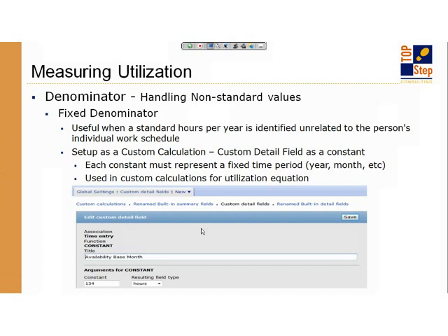The limitation with this, however, I do have to caution you before you get all dreamy-eyed, is you have to define this constant to be a specific time period. So if you do use 1,600 hours in a year, great. This field only represents the value of a year. I can't break that down automatically in OpenAir by month. It only understands it's a constant of 1,600. But I can create a monthly value that's about 134. In this example on the slides, you can see that I have that in there.